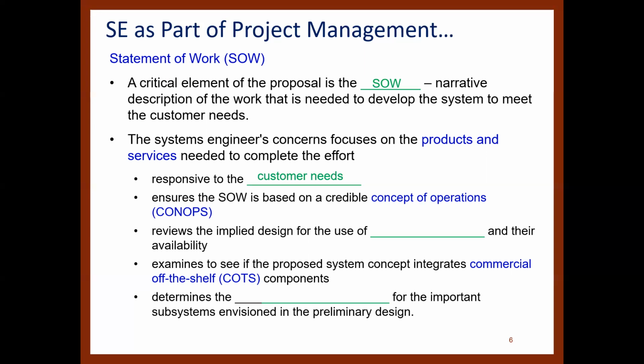Review the implied design for the use of legacy components and their availability. Examine whether the proposed system concept integrates commercial off-the-shelf components, and determine the technology readiness levels for the important subsystems envisioned in the preliminary design.